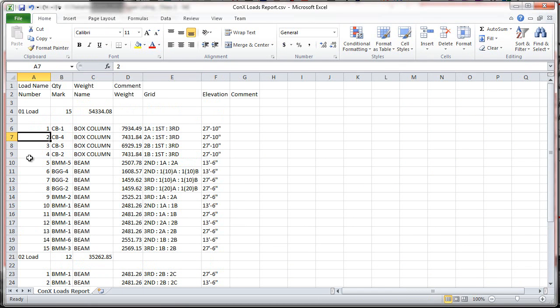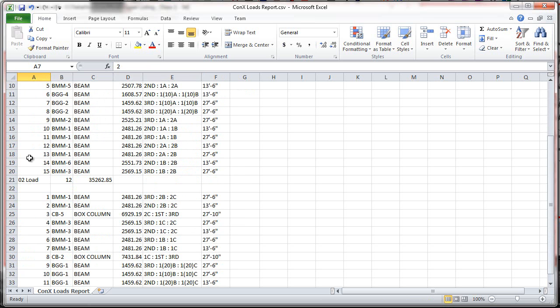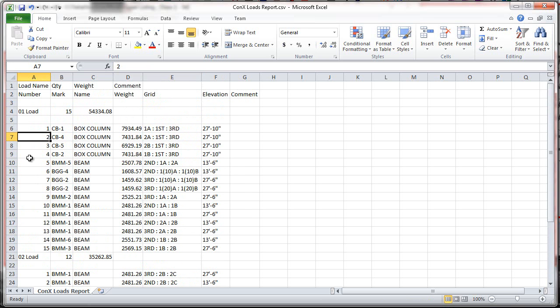This is everything that the erector pretty much needs in order to plan and execute unloading and staging out on the job site, along with the erection drawings. This list can then also be sent to the shop to then plan fabrication, sequencing, and loading.